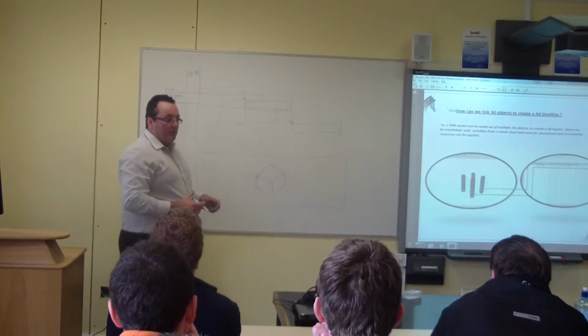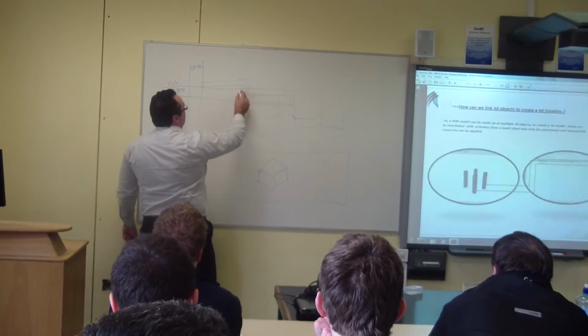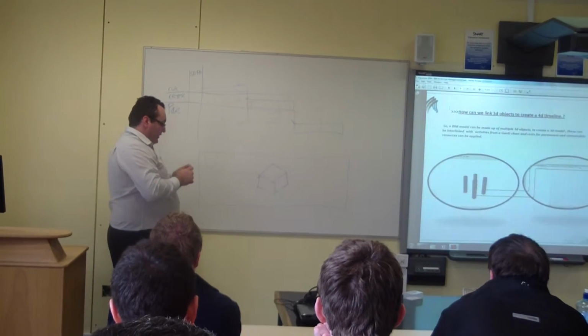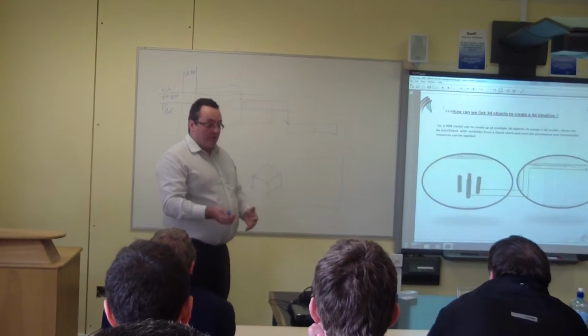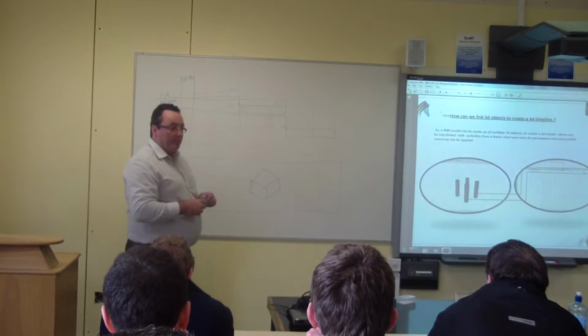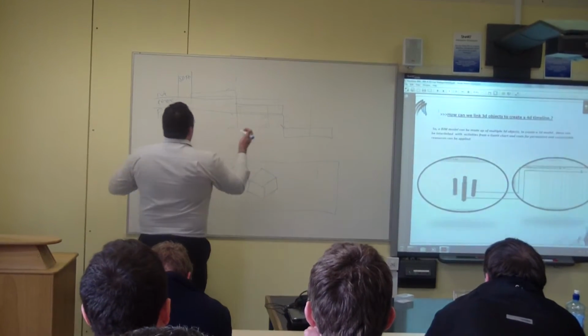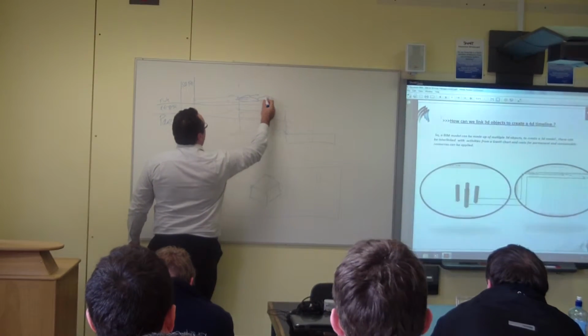What most contractors do is they'll put down a jagged line like this and say that's 70% complete, that's 80% complete. That's what most contractors do. It's incorrect though, because you're not actually comparing against anything. What you should compare against is your contractual terms and obligations under the contract, which is your contract program.